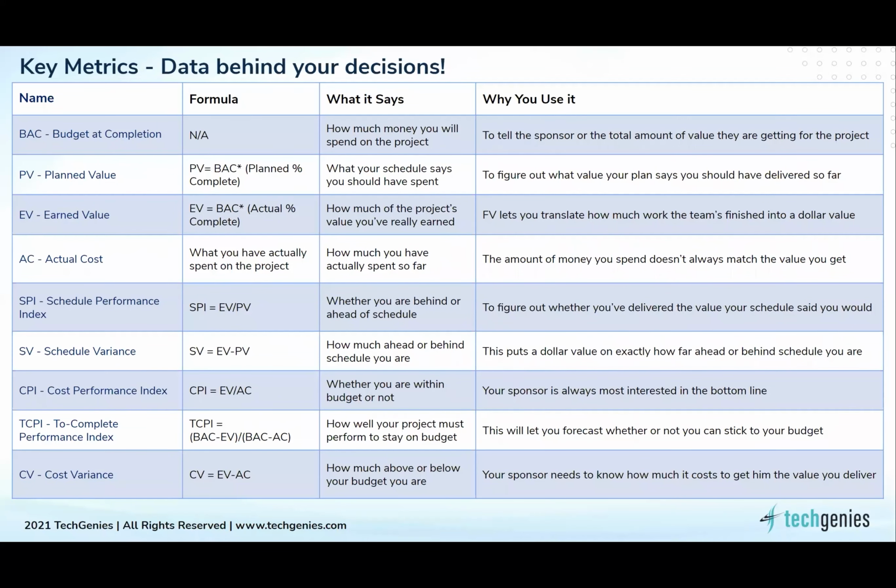Yeah. So in terms of quality, we can have the delivered defect density, the review effectiveness, or my defect removal efficiency. Those are key metrics in terms of quality, which I would expect from my team. And in terms of maintaining project schedules and tracking my project timelines, I would have schedule variance and effort variance, which I would like to review on a monthly or a quarterly basis.